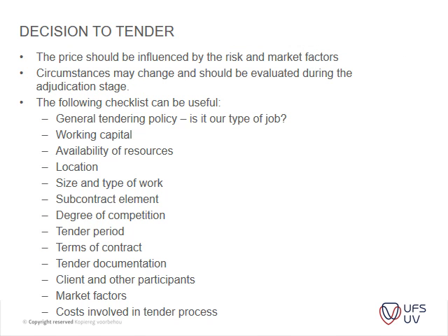Okay, then we've got another thing, which is the decision to tender. You guys should also know this, but this is more supplementary. The price should be influenced by the risk of the market. Circumstances may change and should be evaluated during the adjudication stage. The following checklist can be used: tendering policies, working capital, availability of resources, all those items that I basically spoke of earlier.